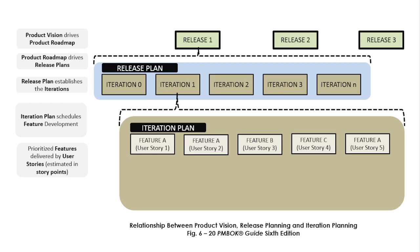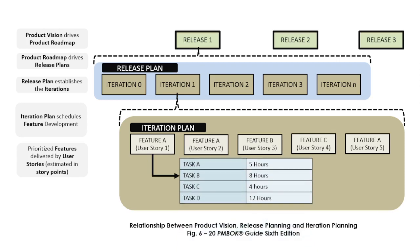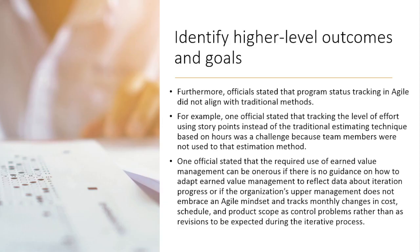In the world of traditional, we do things a lot in tasks — things are broken down into tasks. But you do not necessarily need to do this in the world of Agile. In fact, a lot of mature teams won't do this. Even though you see tasks here, be aware that a lot of teams do not do this visibly. Those people doing the work do this privately — they decompose down to this level if they need to. I need you to get this understanding that in Agile, we are pursuing higher-level outcomes and higher-level goals.